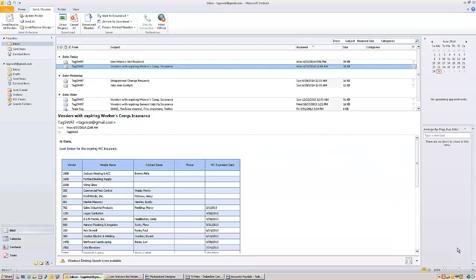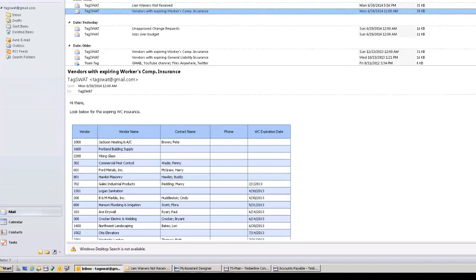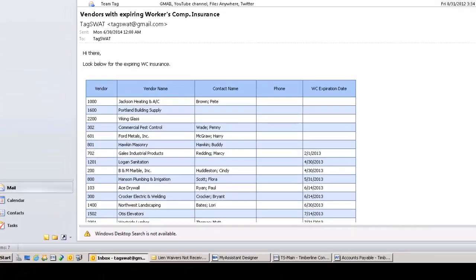As you can see here, I've opened up my email. And inside, I have an email from Sage 300 Construction and Real Estate letting me know that I have vendors that have workers' comp insurance that's about to expire. I can also have my assistant send an email directly to the vendors letting them know that they need to get me their insurance certificates as soon as possible.